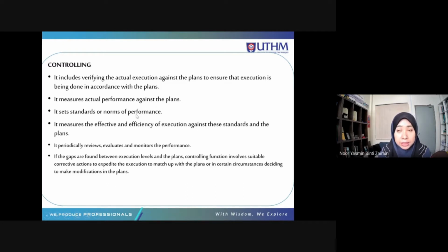Okay, because on site, when you had this design, everything that had been done, you will run the construction. Okay, so the performance, the actual progress will also be quantified. We will also compare with the planned progress. Okay, look at the difference, and then the payment also will be done according to the actual progress.